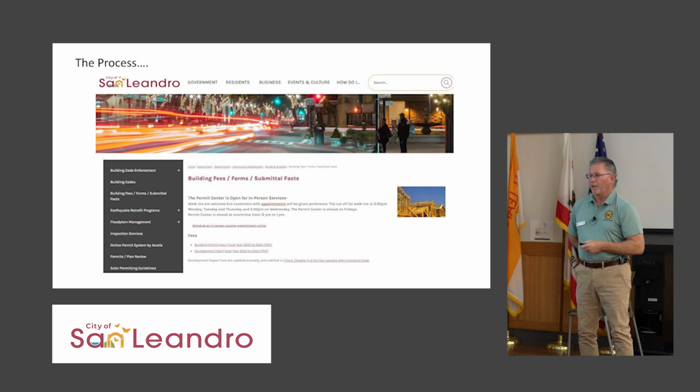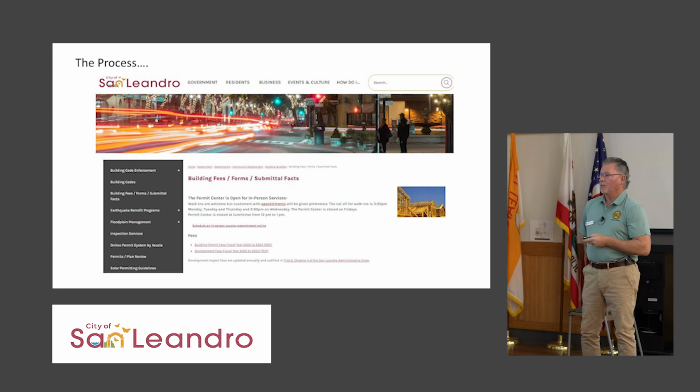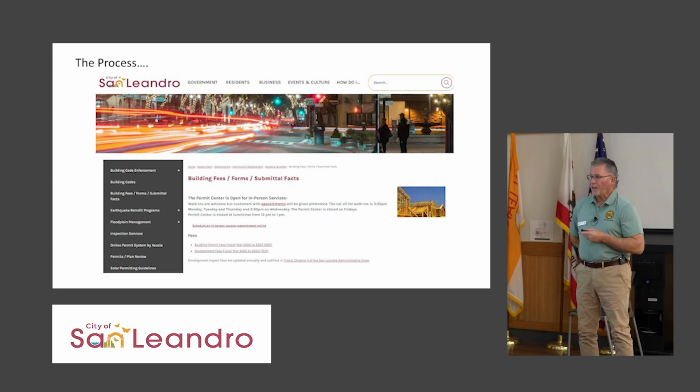It's a $60 million mixed use, and that took 5 years to get off the ground because, first of all, for entitlements, and second of all, plans examination, which is really in depth. Again, we were talking about why it's so in depth, and why it takes so much time. But based on that, that building theoretically is safer than if it were built in another state or anything.